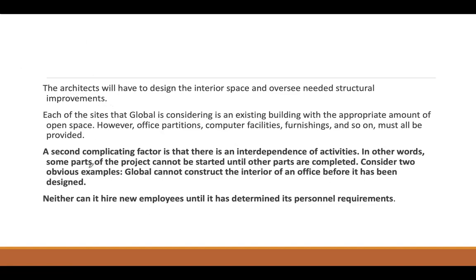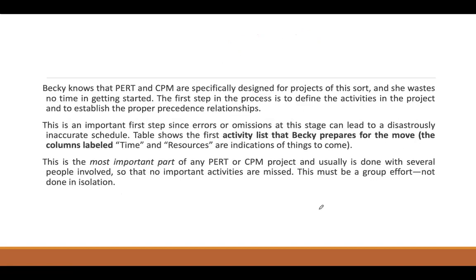So the second complicating factor is that there's interdependence of activity. For example, you can't hire people unless and until you know what the requirement is. So activities will move in a particular sequence. Okay, so there's always interdependence of activities. In other words, some parts of the project cannot be started until other parts are completed. For example, Global cannot construct the interior before it has been designed, right? And neither can it hire new employees until it has determined the requirements.